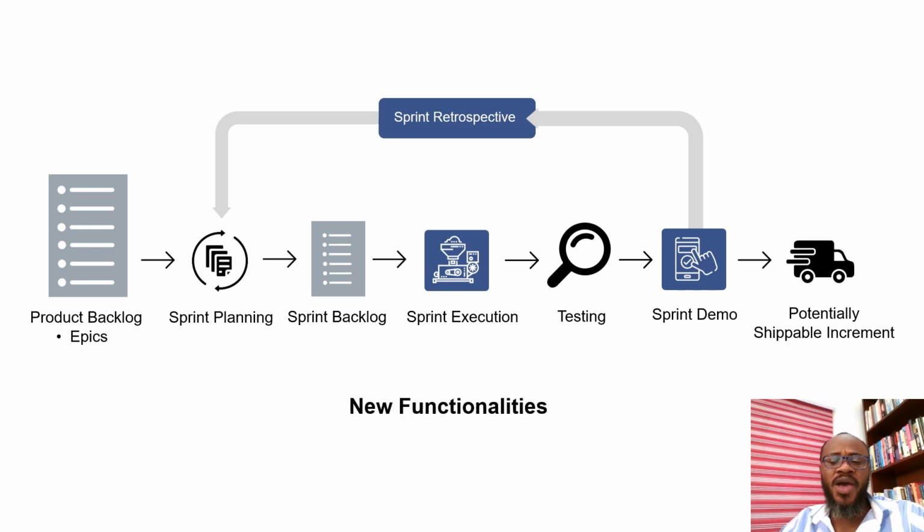The next thing we look at is when there is a change request to include new features or functionalities. What happens? Now, if there is a request to include new features or functionalities, the product owner will include it in the product backlog. But then we would also want to determine the degree of urgency or the priority that we associate to those new features and functionalities.